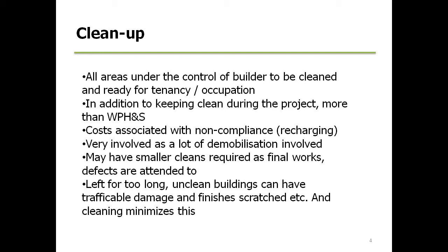In most cases, there's a contribution by all the trades, all the subcontractors involved in the job, to take their rubbish away. If that's not going to happen, it's good practice to warn them. And if they don't do that, then have someone else clean that area and clean their waste away, and recharge them.